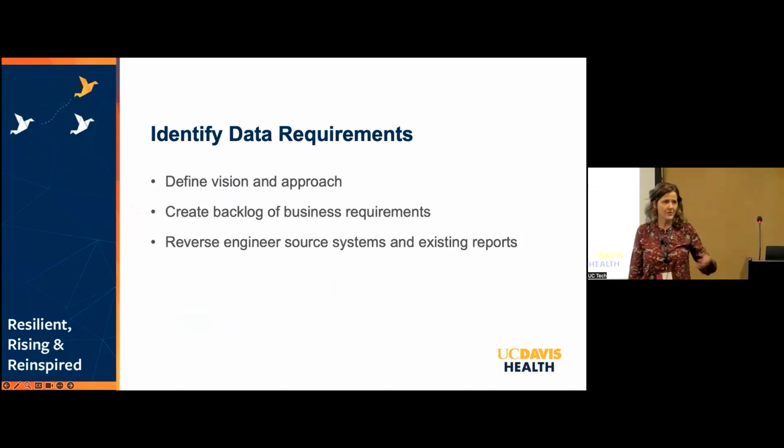Like with any project, we started high level. We were doing Agile, so we just did a project charter, which laid out the vision, the scope, and the parameters. We did this to get the team on board and to get our stakeholders' sign-off, all that box-checking red tape stuff. So we get the vision going, and then you create your backlog of requirements, which for this project was literally a collection of subject areas that we wanted to onboard, organized in priority order like you would in any Agile project. And then the real game begins of trying to figure out what the detailed requirements are.